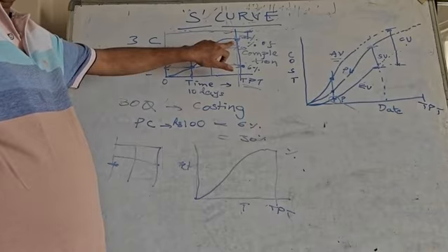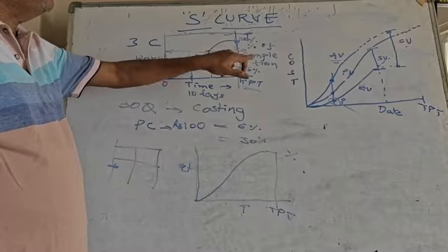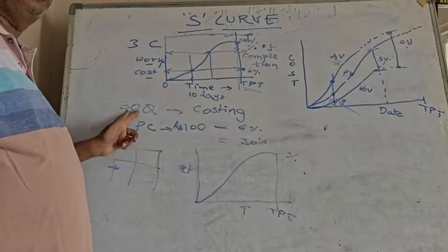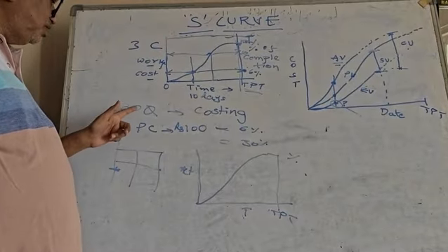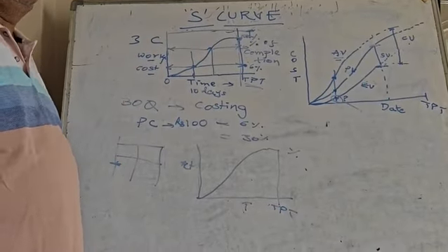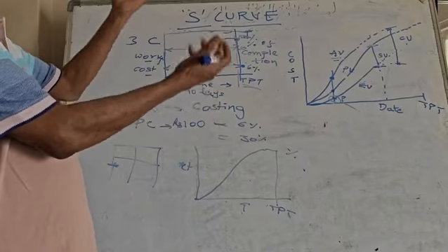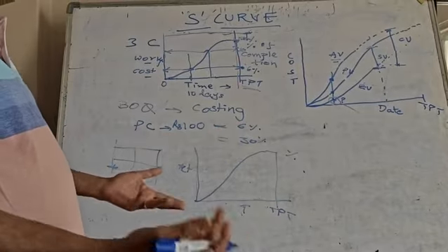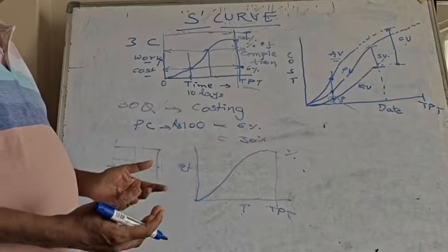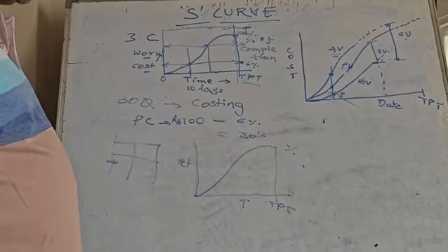Otherwise what does that mean? That means the project is behind schedule. That means you cannot release 100% completion of this BOQ. Whatever your cash flow, you should not release 100% of the money. Because if you pay 100% of the money, then the contractor will take the money and go away. He will say work is finished, he is going. Who will take care of the maintenance for 1 year? Who will take care of the performance bonds? All those things will come into the picture.